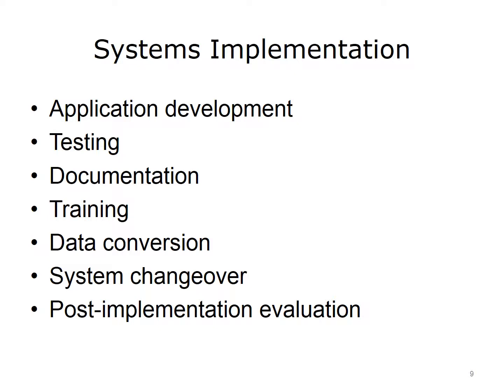After the new system is operational, a post-implementation evaluation of the results is made as part of the final report to management. This evaluation examines all aspects of the development effort and the end product. The final report to management includes the following: final versions of all system documentation; all planned modifications and enhancements to the system that have been identified; a recap of all systems development costs and schedules and comparison of actual costs and schedules to the original estimates; and an assessment of the overall quality of the information system.